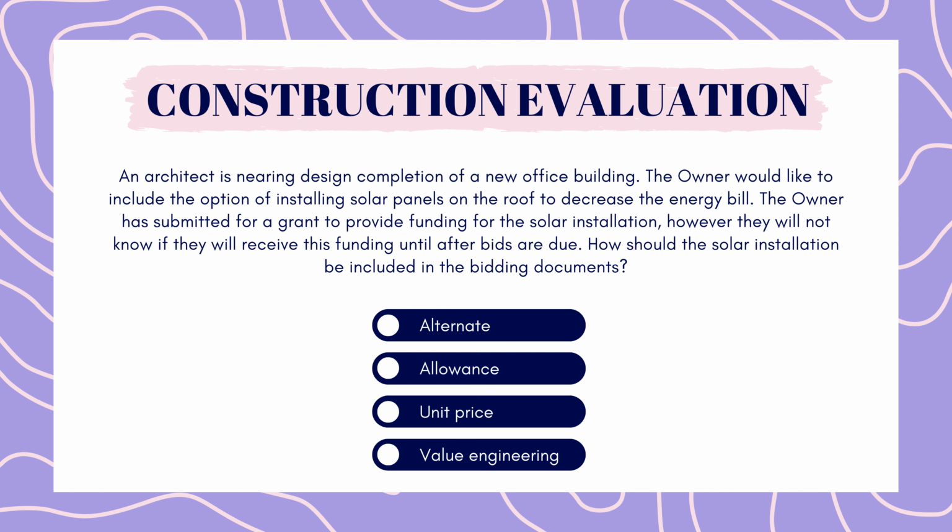How should the solar installation be included in the bidding documents? Alternate, allowance, unit price, or value engineering? Pause here to answer. The answer is alternate.